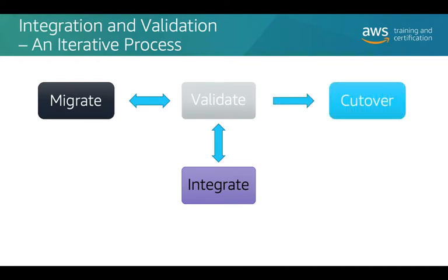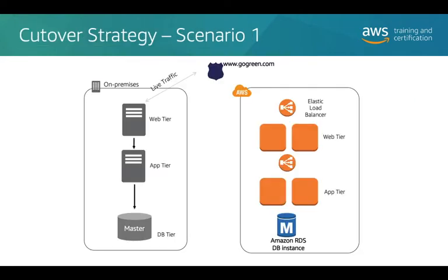And then you need to do a cutover process. That will often mean removing things like replication mechanisms and so on, decommissioning of old infrastructure that is in your on-premise environment, doing a full cutover and handover to operational support inside your AWS environment.